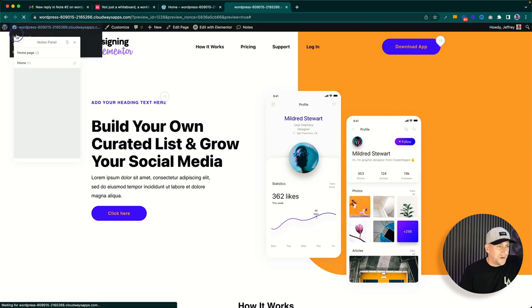If you allow constant back-and-forth with the client, it will eat up so much time and turn into a long drawn-out process — you'll face scope creep. Define it clearly. For example, say: 'We're going to build a landing page. After it's built, you'll go through Notes to tell us what you like and don't like. Then we'll do revisions — usually one or two rounds.' If you let the client go through each section endlessly, they'll try to design the website themselves.